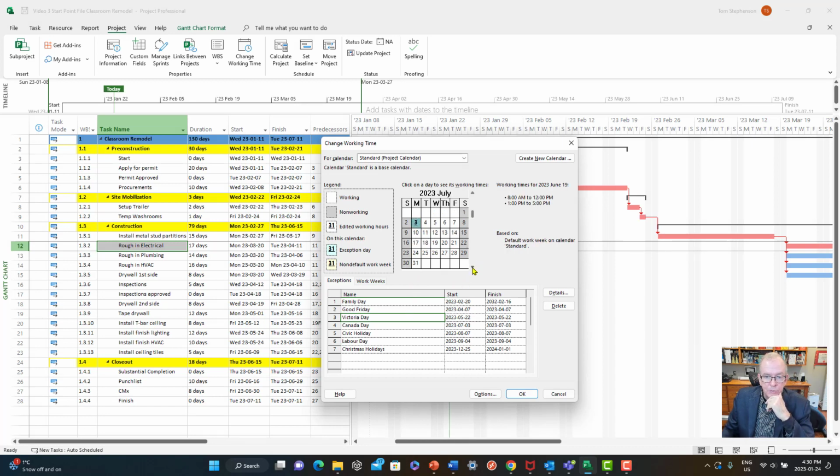The other thing you could do is July too. You could put in for Canada Day, July 1st, and you could say that it's going to be on every July 1st, but then you've got to go in and see which ones fall on a weekend and put a separate line item for them. So that's why, if you're doing one out for 10 years, do it once, and then you don't have to do that every time, right? So that saves a lot of time that way.